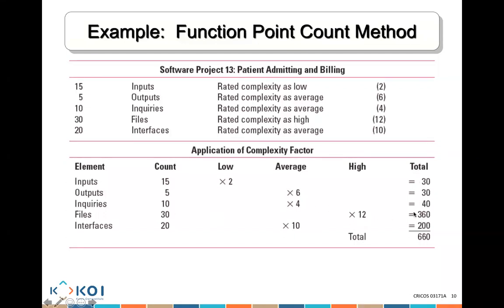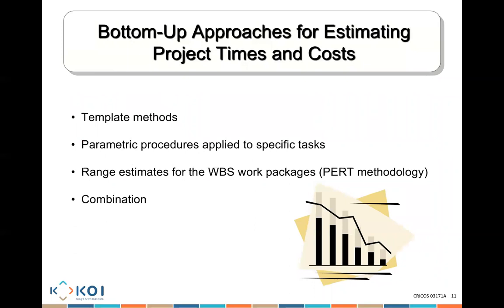So you have all of these function points, and based on them, you can ask yourself, how long does it take me to develop each function point? How much time does it take to actually complete every function point? And you make your estimation accordingly. That's what we call the top-down approach to estimation. Bottom-up approach, there's, for example, the template method.